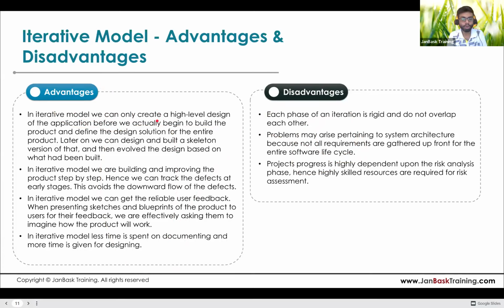In the iterative model, we can only create a high level design of the application before we actually begin to build the product, rather than defining the design solution for the entire product. What does it mean? It means that the entire design or entire architecture is not designed in the earlier stage. A smaller prototype is developed in the first iteration, just to see whether whatever we are thinking can be done. The prototype is developed and it is demoed to the customer.